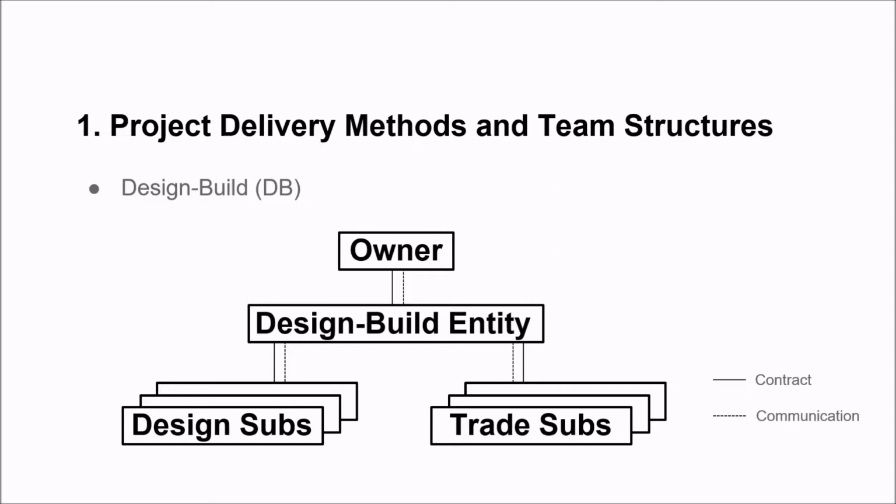Time can be saved because ordering materials and site work begin before the total design is complete. There is a close contractual relationship between the design and construction teams, resulting in fewer design orders by the owner that arise from occasional revisions in design by an owner's AE. Overall, design-build contracting has greater potential to save time and reduce cost.